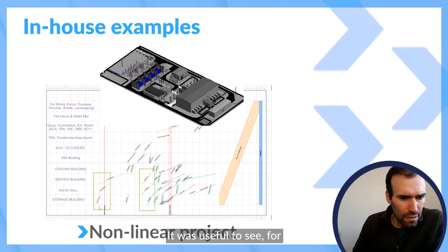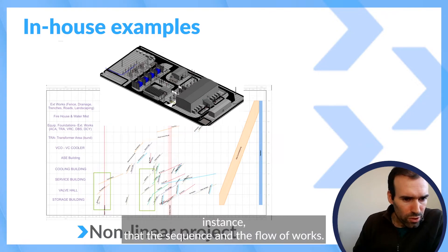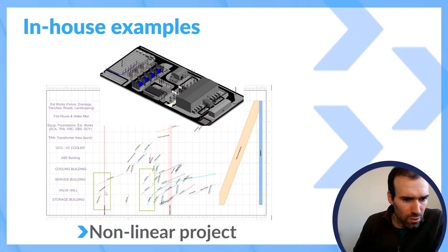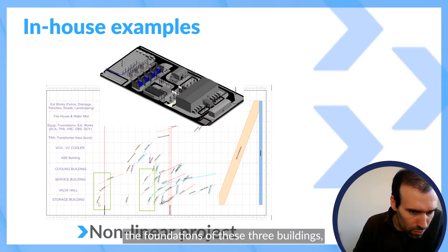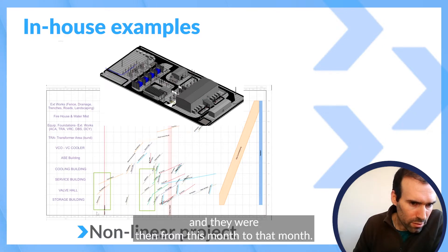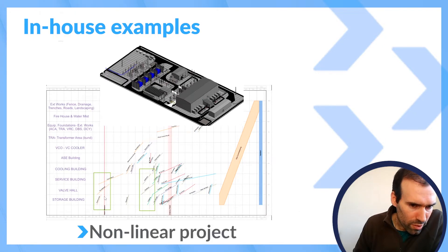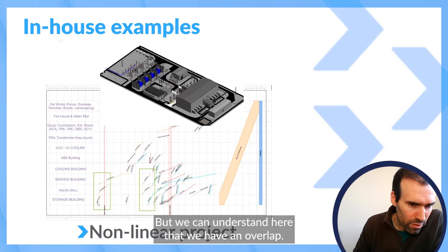It was useful to see, for instance, that the sequence and the flow of works. So for instance here, the foundations of these three buildings, they were done from this month to that month. But we can understand here that we have an overlap, we have overlap of these activities.